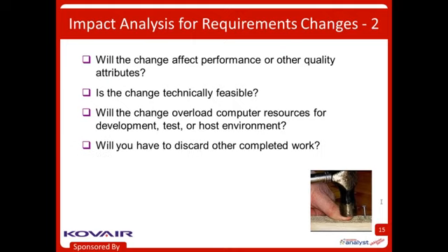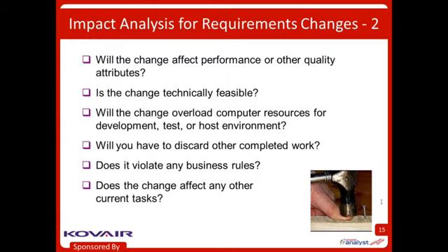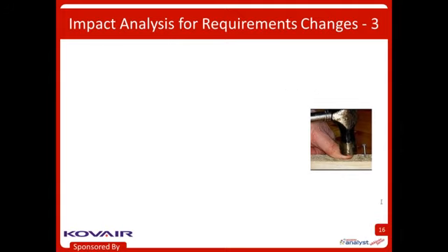Are you going to have to throw out any other work that's already been done? Would this change violate any business rules that are pertinent to the project or affect any other tasks that we're working on? So there's really a lot of things to think about here. And if you just think about them off the top of your head, you're going to miss stuff. So I find checklists very helpful to make sure that I don't overlook important things.